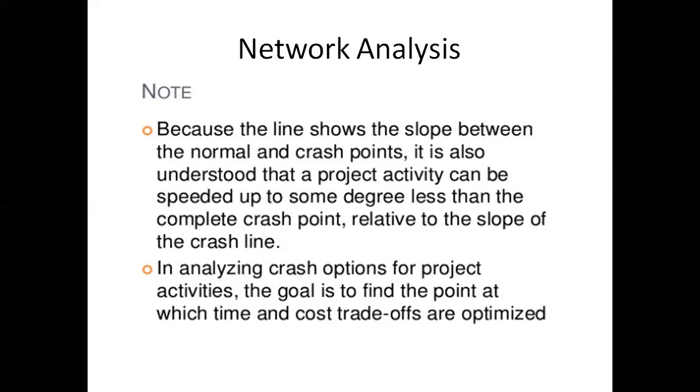To understand the project activity, you can speed up the activity to a certain degree, completing it in some number of days fewer when we are crashing a certain activity. But we have to remember that we cannot eliminate the activity. We can only reduce the number of days for that activity.